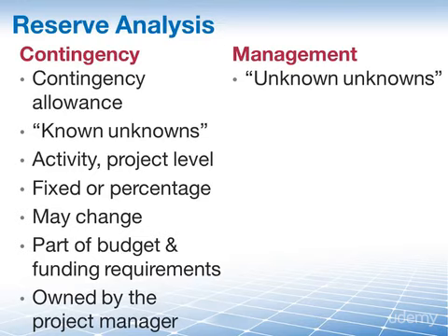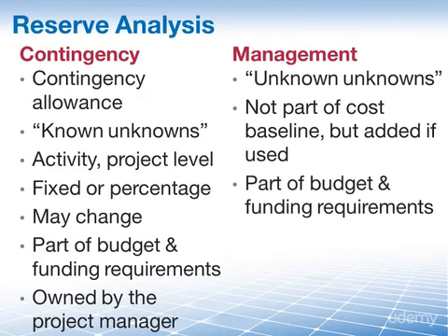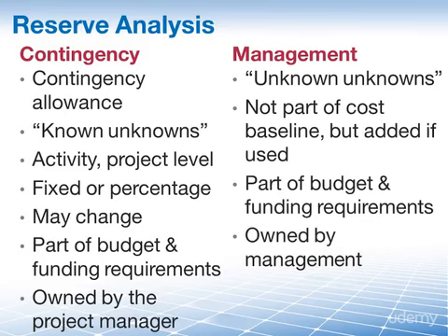It's not part of the cost baseline. However, if the management reserve is used and applied to your project, it must be added to the cost baseline. Note that this update to the cost baseline requires a proper change approval. It's part of a budget and funding requirements of the project, and as the name implies, the management reserve is owned by management as opposed to the contingency reserve, which is owned by the project manager.